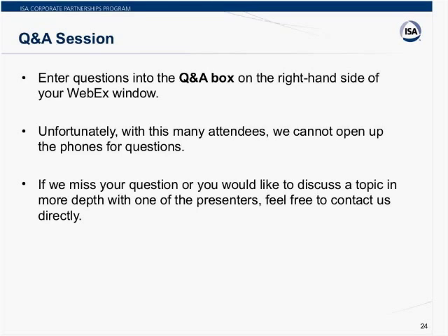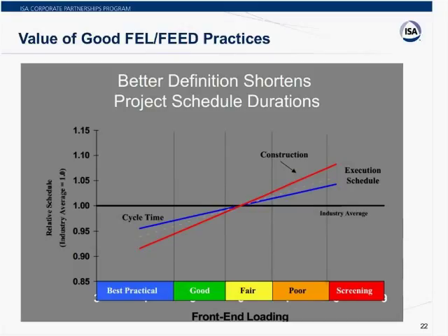I would also add, as we talked earlier about the benefits of good FEL, I think part of your question, Larry, was, versus not having one, and so the potential risk of not doing FEL can be much more than 20% of total project cost. You could pay significantly more for the chosen technical solution than is needed. You could, because good planning and estimating is not done, have to spend a lot of money on the backside doing commissioning and startup with very expensive resources, on per diem,